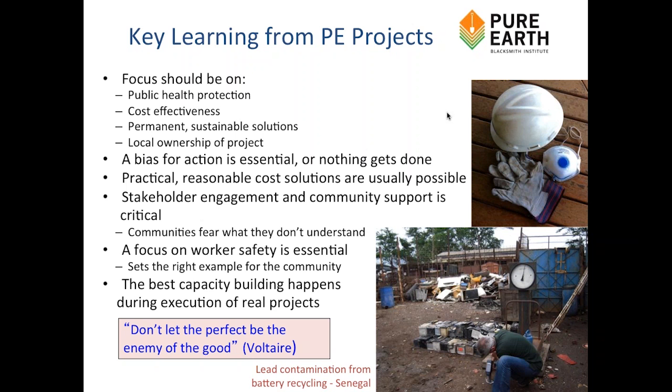We engage definitely with all the local government, the local health department, typically the Ministry of Health for the region or government, schools, if there are any in the area. Invariably, you're dealing with schools. Very often you hold the meetings at the schools. In Dynamai, the goal was to have the public education for 100% of the villagers, and that was a series of 3 different group public education and then door-to-door education for every villager.